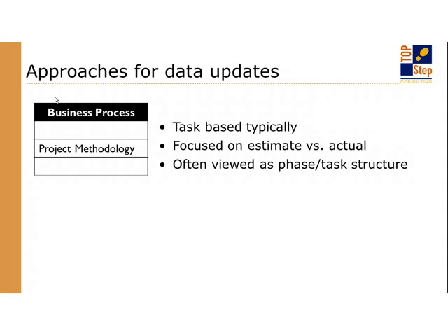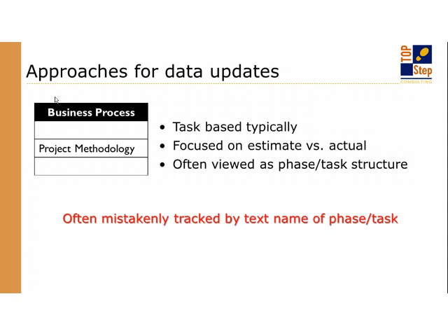And really when you come down to, well, how long are we spending in each of these phases, it tends to be a phase level, not a task level saying, oh, the kickoff went 2 hours versus 1 hour. That's a little too low level. But if you're dealing with things like the design phase, the development phase, being able to understand estimate versus actual so you can refine those estimates or refocus: why are we not spending as much time as we think we should in certain areas.